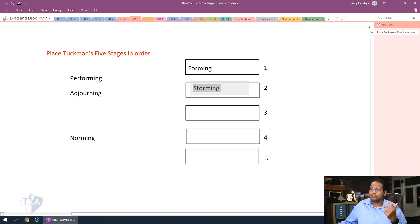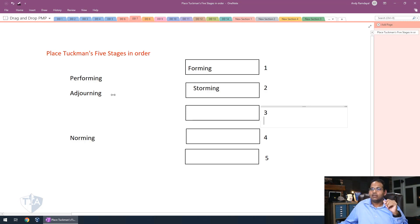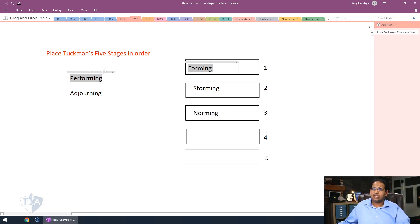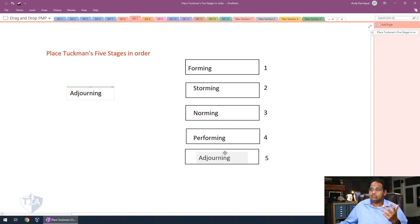During Storming, team members have disagreements — they say 'I don't like doing it this way' or 'we shouldn't use this method.' Eventually they have to come together and start the work, so they Norm. Norming means the team is coming together and coming to agreements in order to actually do the work. Then they Perform — they go out and actually start working on the job. Finally, they Adjourn — the team is done or the job itself is over. On your exam, expect questions where you drag things and put them in order.